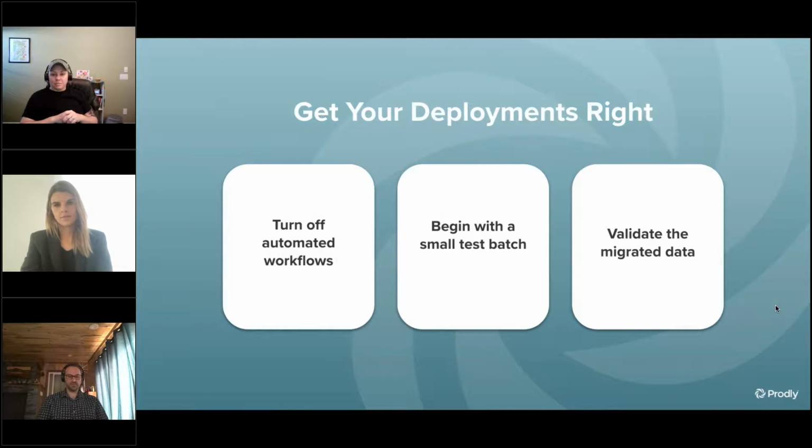You also, which is the validation too, you always, after this whole thing, want to go in there and make sure it actually did what you expected it to do. And not only you as the technical person, but also having someone in the business who's going to be using this data verify that the thing is doing what they expect it to do. So again, CPQ is an example, new product rule, new price rule, whatever. Have your sales ops team or whoever, when your sales reps go in, actually go through the motion of using the new process and ensure that it is working the way that everyone thinks it's going to work.